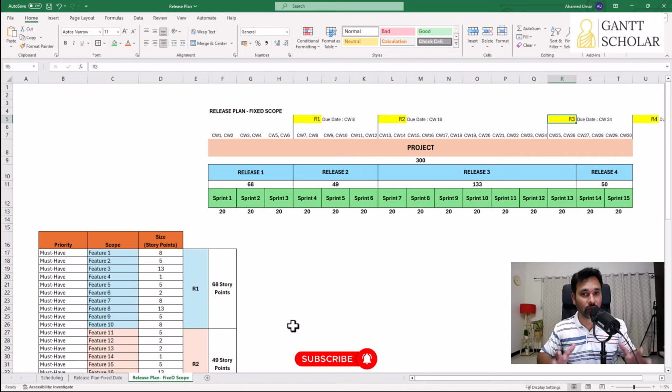So every project must have a schedule, and Agile projects are no exceptions. However, we will be optimizing and updating these plans very often. For example, the total amount of work in the product backlog will change. In the middle of the project, we will re-estimate the sizes of the work, the user stories. The velocity of the team might change. Some more features will be added to the product backlog. Certain items may be removed from the product backlog.